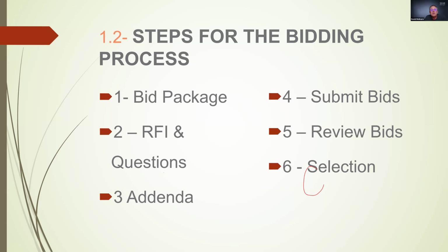The basic steps in this process are assisting the owner with a bid package and the bid documents. Those are going to be construction documents and specifications. There might be other documents included during the bid. During the bid period, you have responsibility to respond to the RFIs and the questions and issue the addenda. I attended a bid walk relatively recently, and the bid conference, as a representative for the company to talk about what's in the documents or just be a resource.